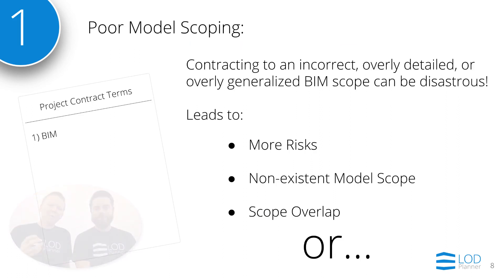The first one is poor model scoping. When you don't have a correct scope — or sometimes you don't even have a scope — sometimes it's too detailed, sometimes it can be just overly generalized, it can be disastrous. We've seen owners just have a very general scope: 'I want BIM, I want LOD 500.' Then we've seen owners copy and paste contracts and they just don't get what they want — it's somebody else's desires, not their own. There's a lot of scope risk when people are signing up for BIM not knowing exactly what they're going to have to do, which causes some big issues.